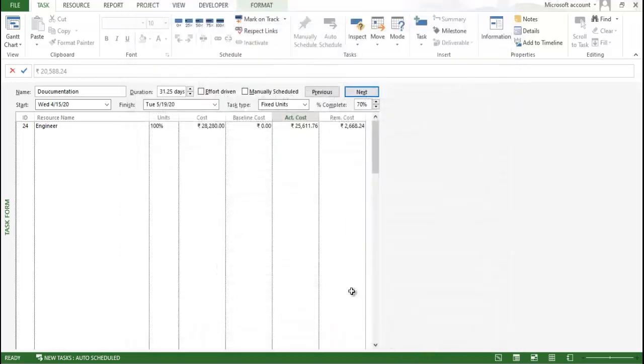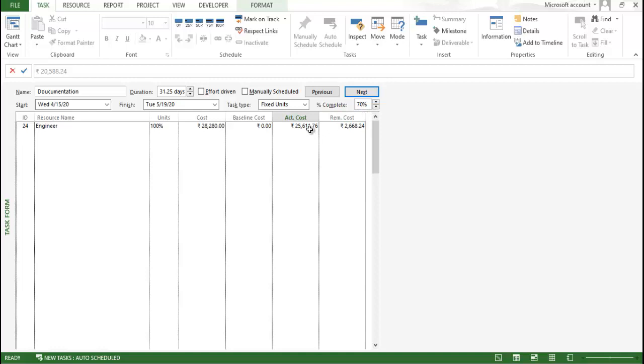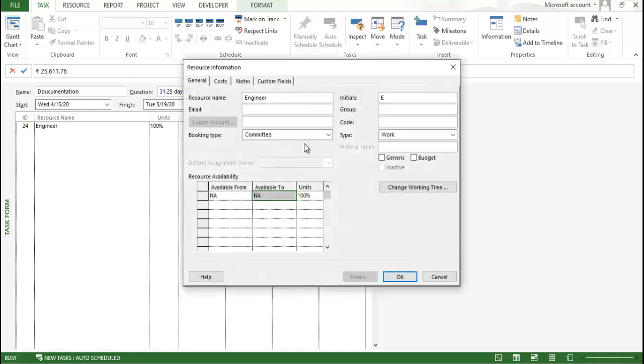So, what is the meaning of this? As you provided 70% it took the cost of 25,000. It takes some time to reflect the cost. Don't worry about it. So, now I want to edit this particular cost. So, what I can do? I just double click on this.